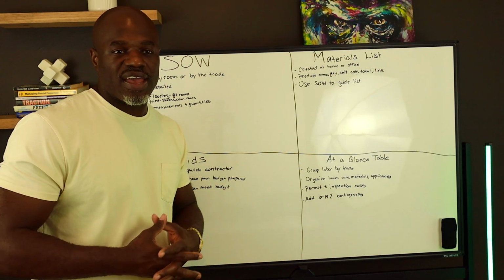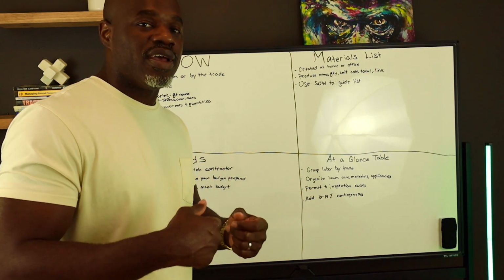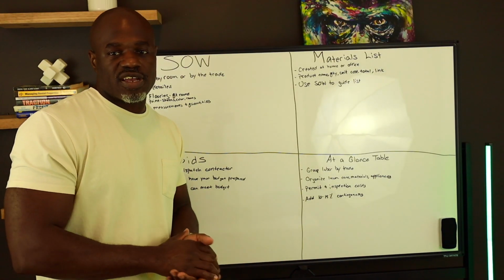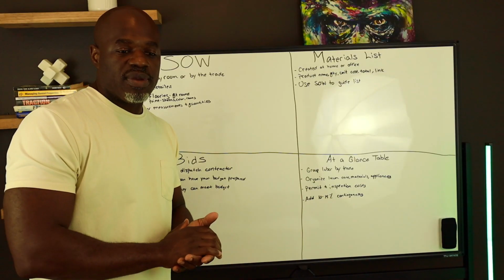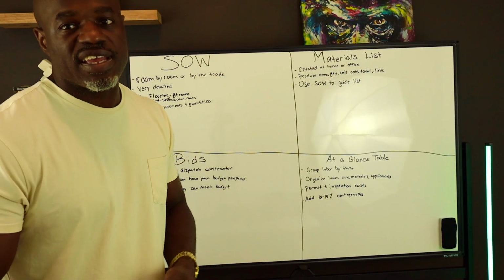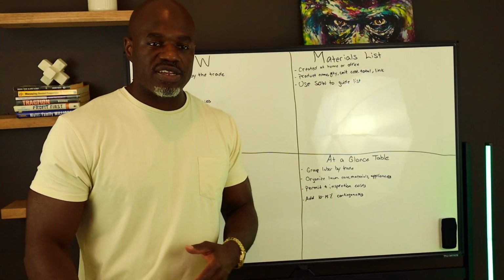And we have a proposal email, or a renovation proposal email, that you can shoot over to your contractor. Hey, here's the scope of work. Here's the budget. If you can meet the budget, the job is yours. If not, let me know. We can talk about it. You can compare that with some other bids or whatnot.